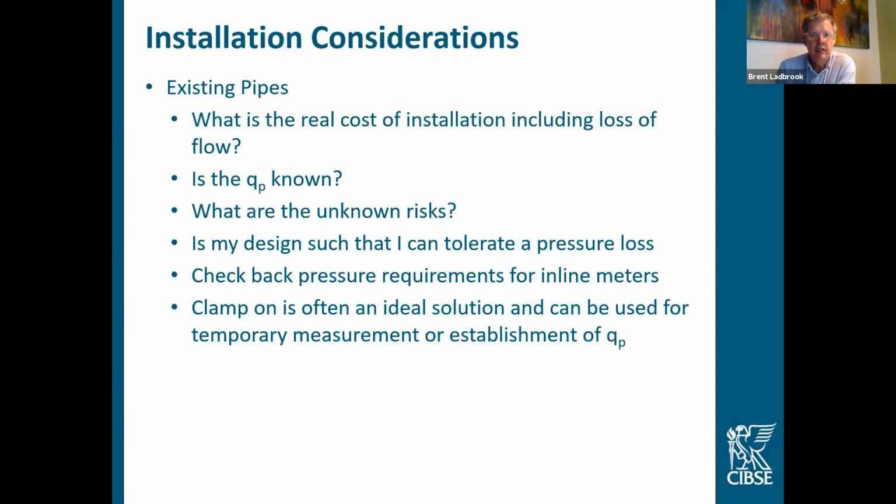Do you know what the flow rate going through the pipe is? How do you size an inline meter? You may have to measure that to know, because the drawings are all obsolete because there's been adjustments to the system since it was installed and commissioned. What are the unknown risks? What happens when you cut the pipe that's 15 years old?